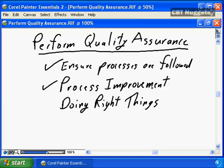But when team members find better ways to do things, they need to feed it back into the quality assurance process, put it through a proper process improvement process, so that it can be reviewed and evaluated to say, yes, this team member has in fact found a better way. Let's implement that project-wide so that all future deliverables, all future components for our project are delivered using this better process, as opposed to one hero. And I'm sorry to pick on the term hero, but often it's the heroic